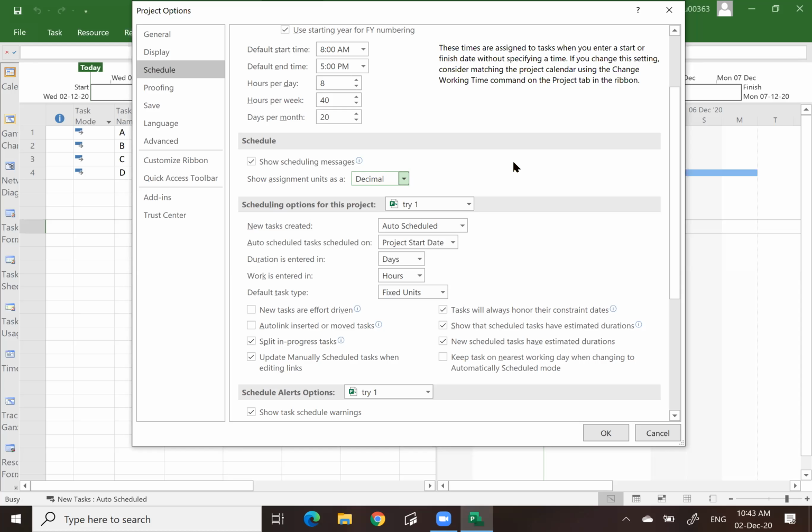an excavator. You have 2 excavators, meaning 2 in terms of number. But if you choose to use percentage, that will show 200%. Okay, 200%. Meaning if it is in percentage, you can also have 50% or even less. So 50% is equivalent to 0.5 in terms of decimal.